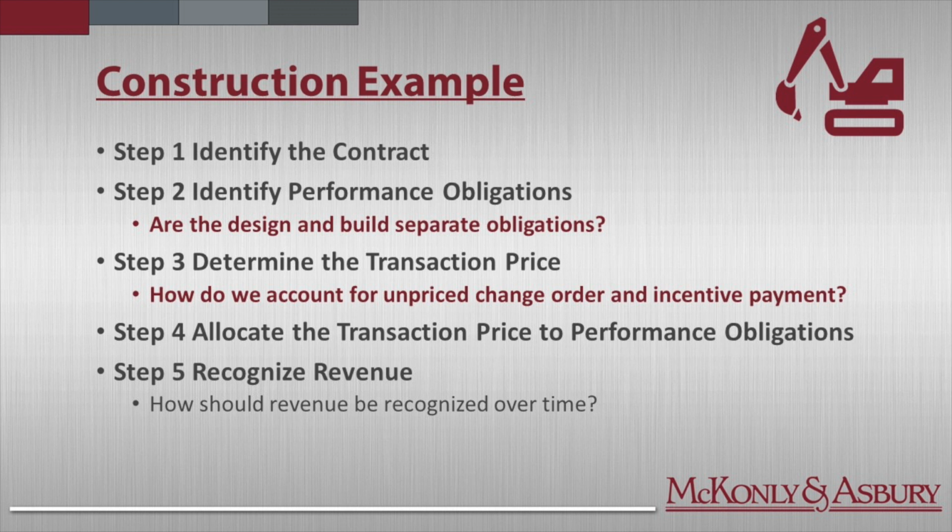To Janice's question, if you build a bridge and it's maybe going into a more touristy area, like a beach, the bridge might have a visitor center. So they complete the bridge and part of the contract says, okay, you have to build a visitor center. That is completely separate. While you have one price, that visitor center is now a separate obligation. So you would take that $90 million, and knowing this contractor has experience with these types of projects in the past, they can definitely allocate what the bridge is going to cost versus the visitor center. I wouldn't say easy, but they can allocate that price to those separate obligations, even with only one price.